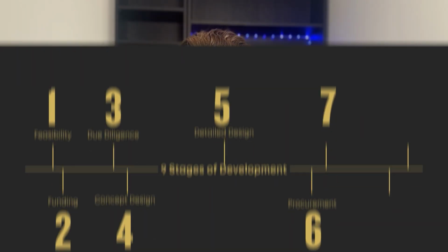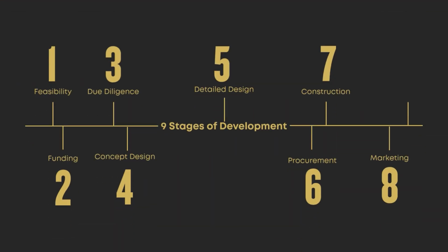The next stage is labeled as stage 8, but if it wasn't so confusing, I'd actually have 2 stage 7s, because sales and marketing should run in parallel with construction. You want momentum on site and in the market. If you wait until the building's half finished before you start promoting, demand may have cooled. The smart move is to build interest early, ideally as soon as design is locked and visuals are ready.